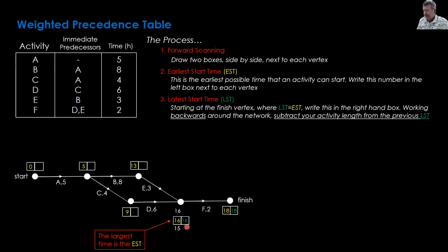Great. Now, we have a choice. We can go up or we can go across. Which way should we go? Let's see. Let's go across. 16 take away 6 is 10. Let's go up this one. 16 take away 3 is 13. Now we've got a junction going backwards, haven't we? Well, let's move the box up a little bit.